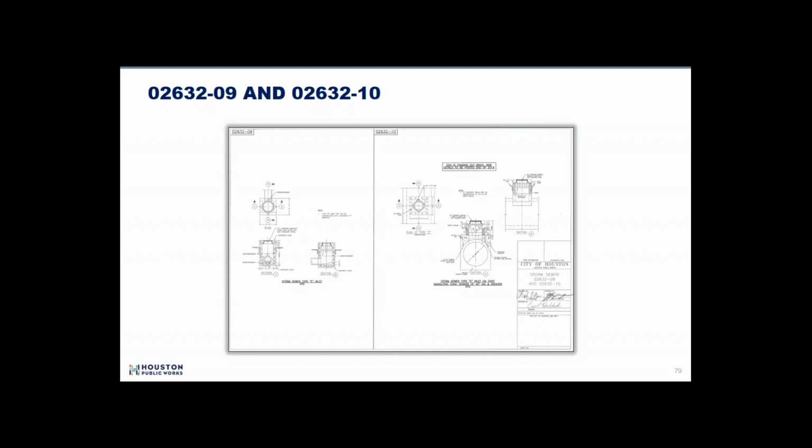So the revision dates have gone away. No longer does an internal PM have to track down and make sure you're using the right division and the wording is right and people are doing all this correctly. That's kind of a little maddening, honestly. We put out a specification. It is there. When it bids, that's the one that's applicable. We are doing our best to make sure that you're aware of any changes. The contractor's aware of any changes. There's no secrets here. That's all posted and public and getting that information out to everybody.